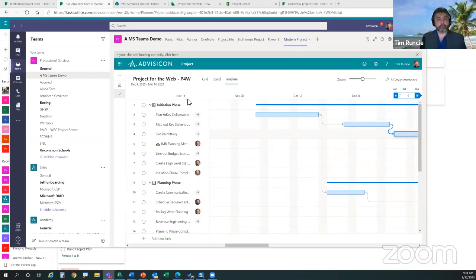One of the things that organizations wrestle with right now is, where does documentation live? Is it in my Planner board? Do I have to put it in a formal SharePoint site? Hey, listen, if I've got documentation in a team channel, do I actually have to have it stored somewhere else? Where do they actually need to live? And some of those questions are great to decide. Listen, for most of the working documents, great. They sit there on the team side, or they sit there in the Planner board. But we might have formal charters or decisions that need to be made and formalized, and we'll put that in our formal SharePoint site, or we'll do that associated to Project.